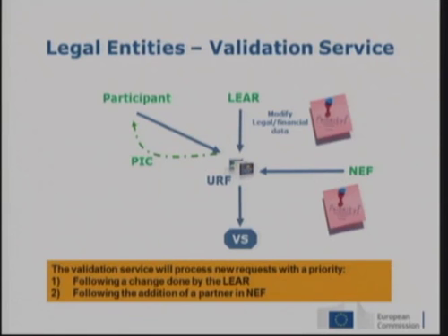So what is the difference between negotiation and amendments? You cannot delete beneficiaries in an amendment. You can terminate them, and then you will have the date of entry and date of termination. All the changes done to the legal data from URF will be reflected, as I was saying, for negotiations, but not automatically for amendments. That's basically the things you were doing with negotiations, and I guess some of you already with amendments. Do you have any questions so far on this part?